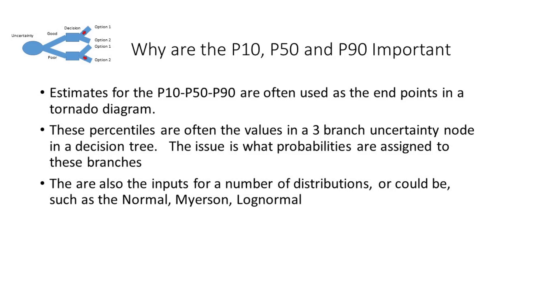So why are these percentiles, P10, P50, and P90, important? Well, they're often used as the endpoints in a tornado diagram. The tornado diagram has to reflect the uncertainty of each of the uncertainties, and so oftentimes it's the P10 and P90. It could be the P5 and P95, but you want to use percentiles rather than some multiplication.